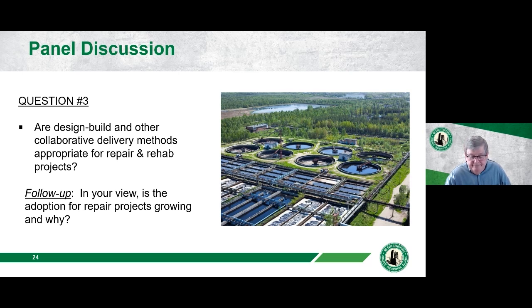Anna? I wanted to expand on something that Andrew said about how he would design a cathodic protection system differently if he knew the contractor versus not, because of the comfort level. That really keys into a key concept when it comes to collaborative delivery, which is that design bid build is historically you're designing to bid. So you have to look for any possible loophole that a low bid contractor is going to try to take advantage of in a specification and then change order thereafter.